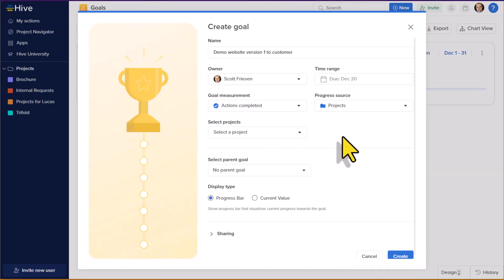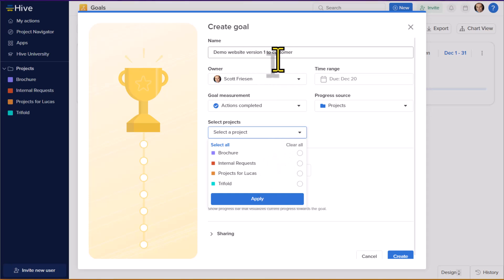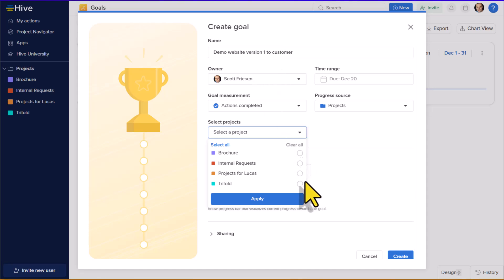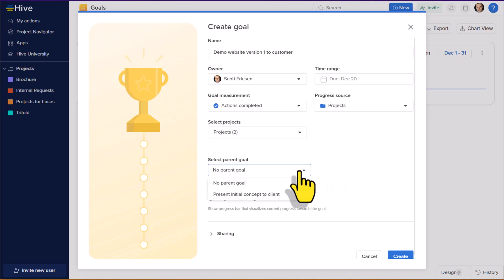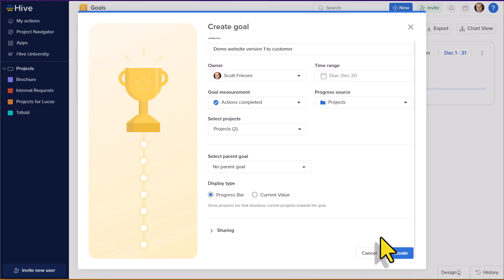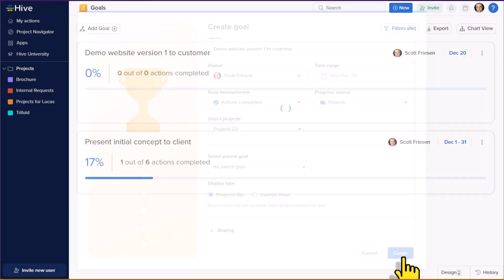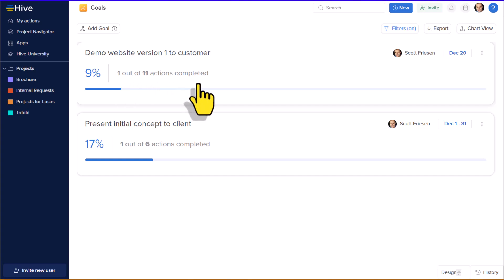So whether we want to calculate the number of actions completed or track the number of overdue actions, or maybe we want to manually enter in a number, we can select that here. And what is going to be the project source? Well, we can say the specific projects, and maybe there are two or more projects that are related to this milestone. You can select multiple projects here and go beyond just the scope of the space which you are working on. You can even choose if you'd like to make another goal a dependency in the case that you need to hit something else first.